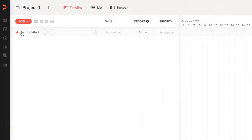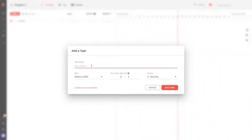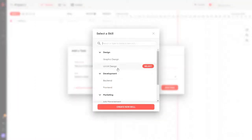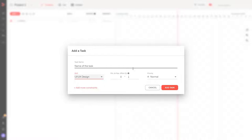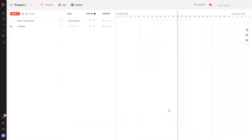Here we are. We can see this folder with one task to start. What we can do now is add a task or a list of tasks. If we don't have many tasks, we can add them one by one by clicking here — we've seen this in a previous video. All we need to do is add a name for the task, select the skill required, estimate the effort, and add dependencies if there are some. Let's add a task.